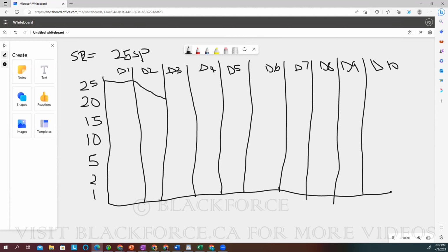So let's say in day 3, we finish 3 story points. Where will you burn it down to? 15, right? Because in day 2 we are at 18. You now finish 3 story points in day 3, so it will come to 15. See where 15 is. This is 15. So you burn it down to 15.